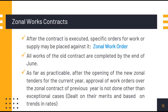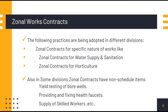All works of the old contract are completed by the end of June. Before commencing the new contract, all old works have to be completed. As far as practicable, after opening of the new zonal tender for the current year, approval of work orders over the zonal contract of the previous year is not done, other than in exceptional cases. In some divisions, there is a practice of giving zonal contracts for specific nature of works like zonal contracts for water supply and sanitation, zonal contracts for horticulture, etc. Also, in some divisions, non-schedule items are included in zonal contracts, such as yield testing of bore wells, providing and fixing health faucets, supply of skilled workers, etc.